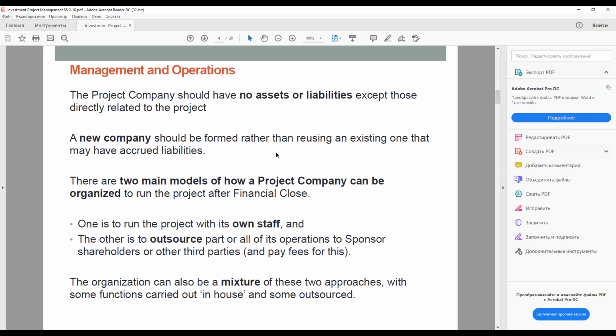Arrangements must be made to ensure a smooth transition between the two phases of the project. For example, bringing the post-financial close team into the negotiations at an appropriate point so they can understand what is required. It's also useful for the development team to write an operating manual for the project finance aspects of the project to provide a guide to the documentation and summarize the lenders' requirements. Just as the transition from development to financial close needs to be well managed, so the further transition from construction phase to the operation phase may also involve a new team at the project company, and similar transition management is required.